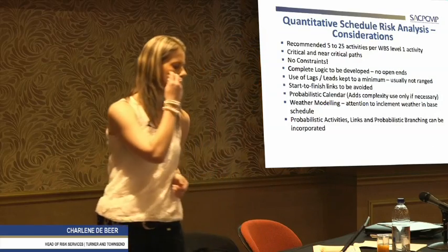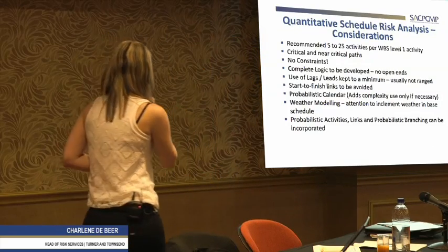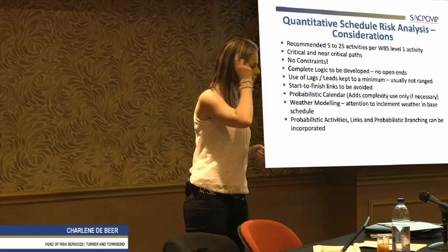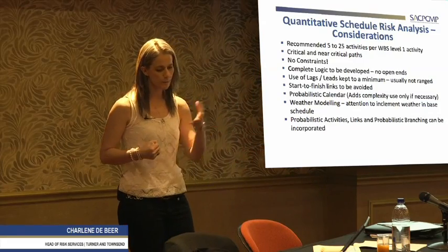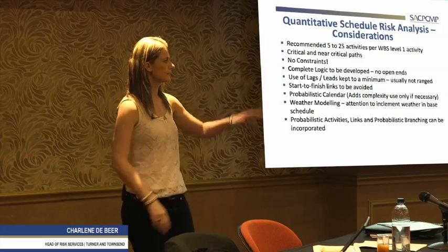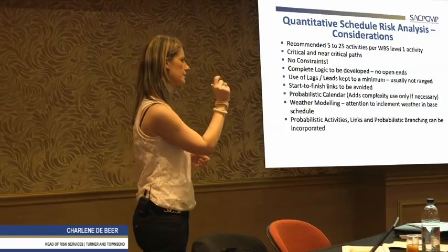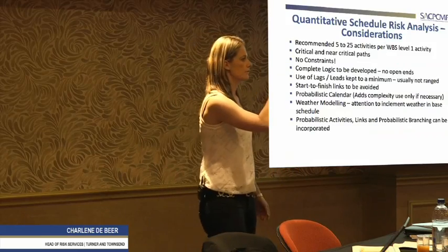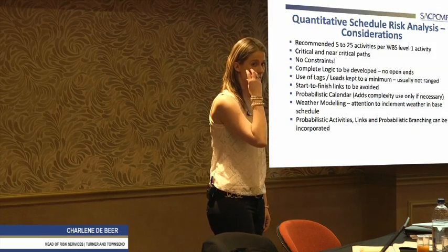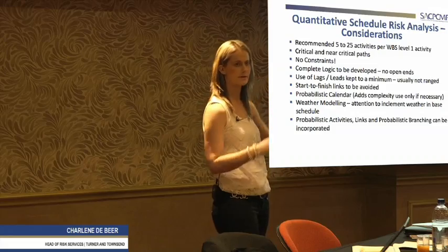So quantitative in a schedule. So what we do is we get the program, we import it. It's got your whole schedule. Let's say it's got 5,000 line activities. They've all got activity numbers assigned to them. We take the risk register and we're saying the valves are going to be late. The motorized valves. Where in the schedule do we need to install the motorized valves? Where's the procurement and the installation?